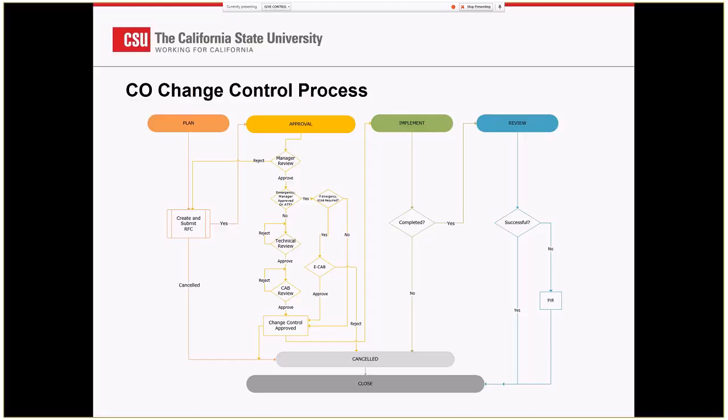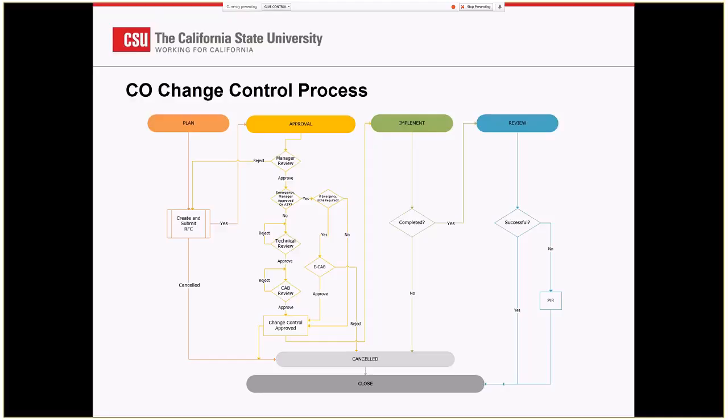There are cases where we can't agree on it and things get rejected. So they get rejected, we cancel them, and then they have to go back to the drawing board. Once it's completed, they implement it, and then we find out if it's successful. If it's not successful, we periodically have to conduct a post-implementation review. Right now, the post-implementation review, we use it to discuss any failed changes or changes where the due date's come and gone and it hasn't been closed out.